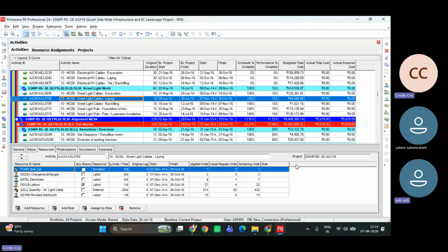That's why I thought, why are we adding both resource and expenses cost. No, here you have added only the labor count and machineries for this particular activity, and cost in expenses. That's what I'm trying to tell. Resource loading, cost loading is two different things.